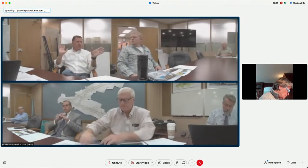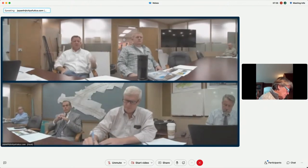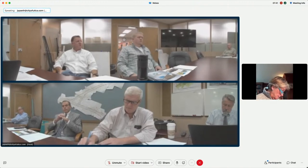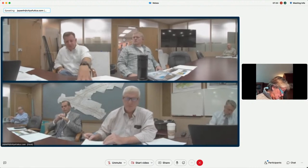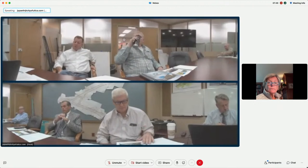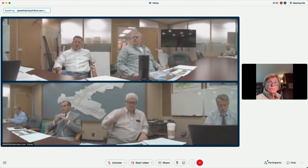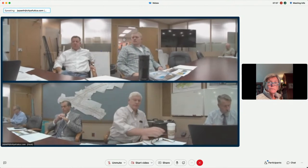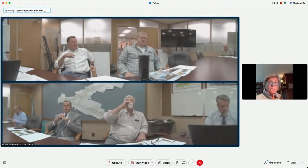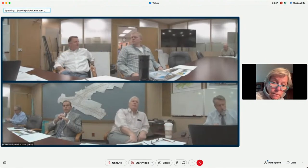Now, one of the other things we want to say to everybody here: anytime anybody would like a tour of any of these properties to see the progress, by all means, just let us know. More than happy to take you through. The interior of the New Century has been substantially reframed. There was a lot of structural work around the stage that we didn't anticipate that slowed down the finishing of that project, but that's been done. Floors have been removed. Foundations have been supported with additional shoring up from the basement. So that project's coming along pretty nicely.